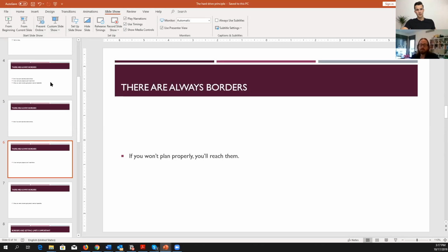Question the client. There are several ways to go about it. First of all is to really conduct your research before you start a project. If it's something the client needs to deliver, you need to know about it beforehand. If you say, it might take me a few weeks to get that, ask him how much time it's going to take, because I'm going to take it under consideration, because I have someone working on it.